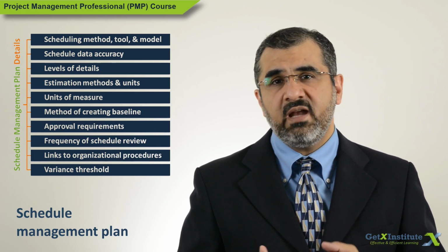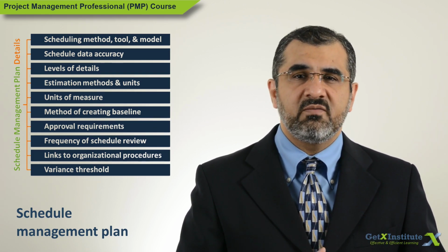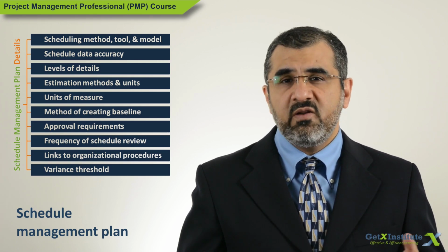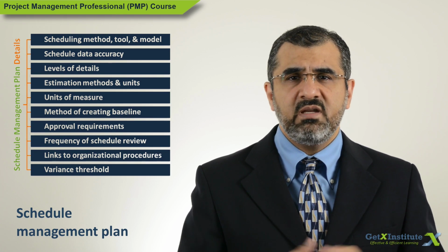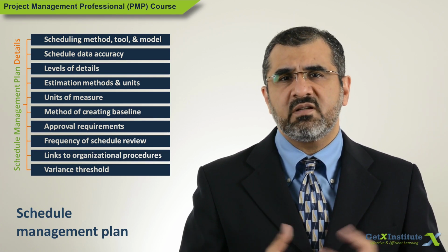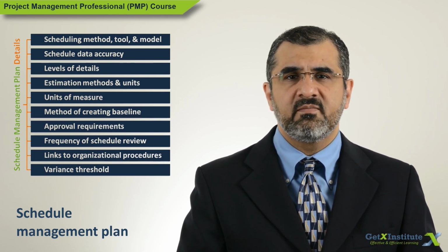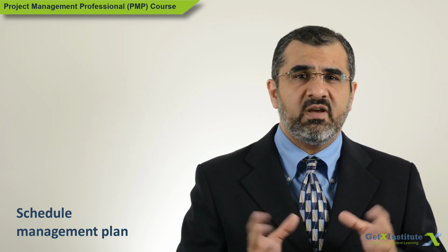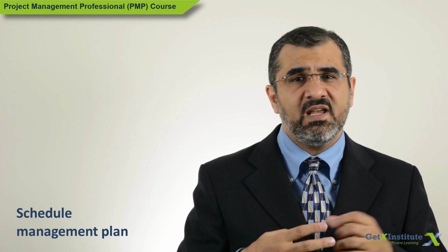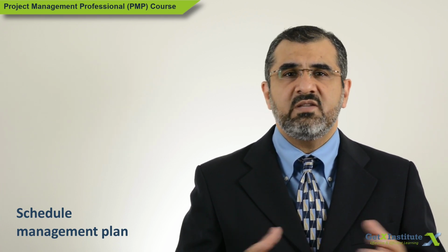This goes hand in hand with tracking schedule performance, which can be done using earned value management or simple variance analysis based on percent complete or how many deliverables are completed and how many are left. So with answers to all these questions, all this information is written down in the schedule management plan.